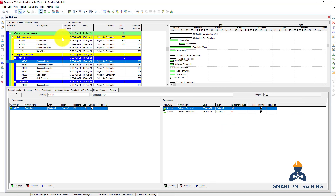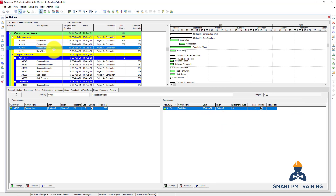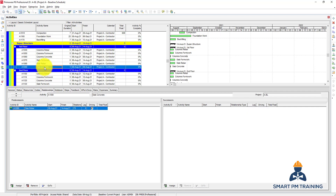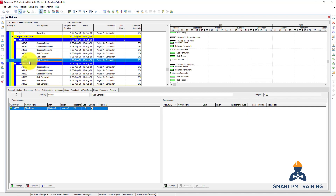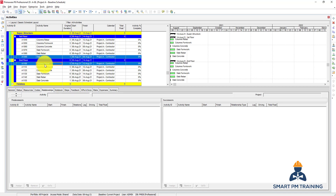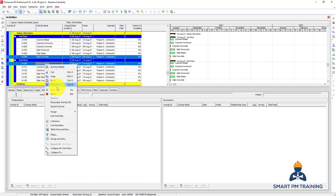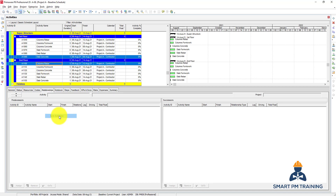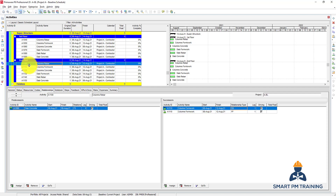So we have now linked the substructure with the superstructure - this is only an example; there can be a ground floor as well. After slab-concrete for the first floor I will link it with the columns-rebar for the second floor: Control-click on column-rebar and link activities.